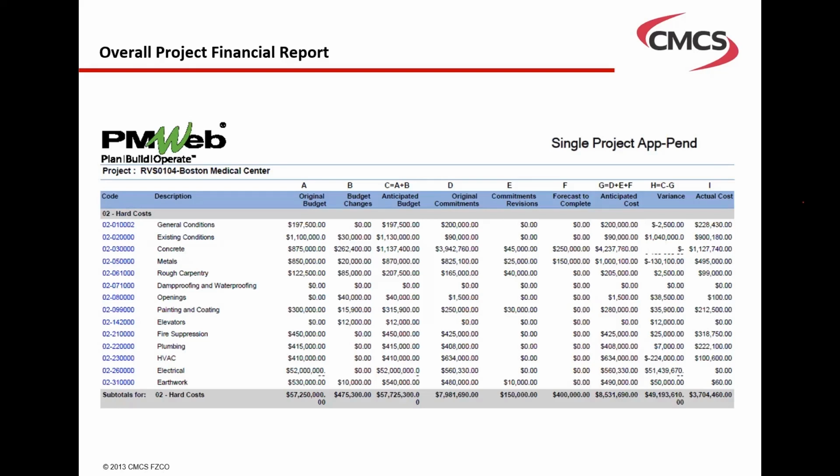How about the work in place that's been approved by your team, but not yet invoiced? This again represents actual cost for the period. So again, I can capture this data, which is usually captured in a process called the joint management report, which is done on a weekly basis to capture all the work in place that's been accepted by your project team, but not yet invoiced. Plus all miscellaneous invoices that could carry actual cost as well as actual costs from timesheets.